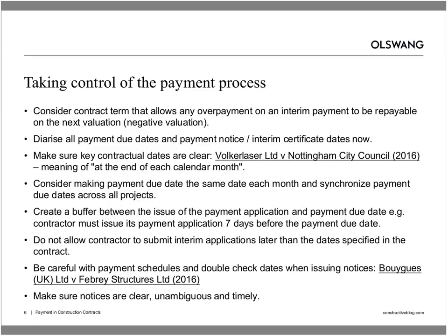I think if you're dealing with a large portfolio of projects, it does make sense to synchronise the payment due dates and make it the same date each month and synchronise that across all of the projects that you are dealing with. Again, it just helps minimise the chances of anything falling between the cracks, although clearly it might mean that you're very busy on particular days of the month. Make sure that you leave yourself enough time to deal with the contractor's payment application.